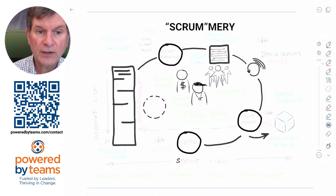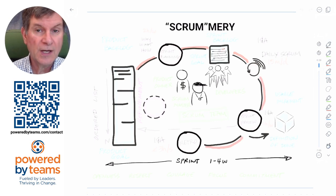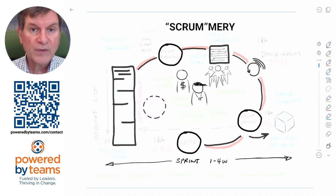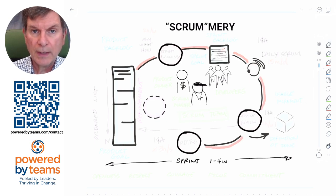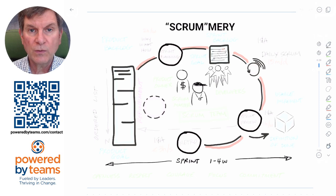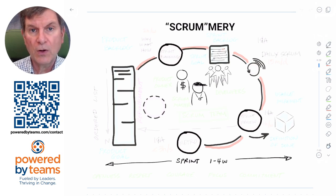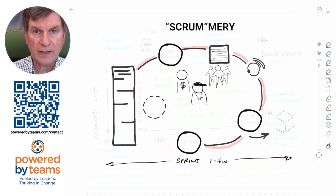A good place to start with Scrum is with one of the events — the sprint — which is a time box of up to one month in length within which all of the work occurs. It's a container for all of the other events.